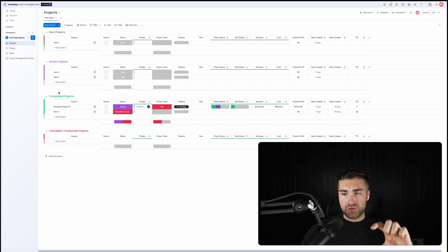The reason we use the groupings, and why the groupings are important, is that if you're tracking from these projects here which are still open and not completed, then this takes them into consideration in the average. So we only want the average of the completed projects. So the same setup: we've got date created, date completed, TTC. It's identical to what we've just done on tasks.